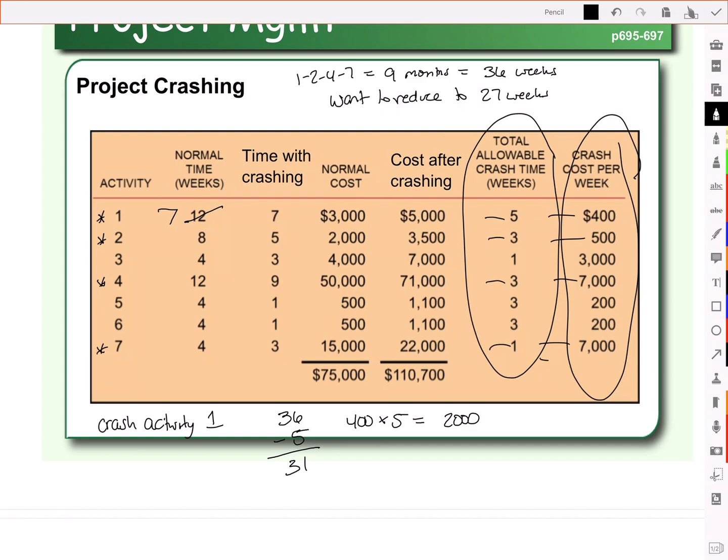So remember our paths that we found before were 1, 2, 4, 7; 1, 2, 5, 6, 7; 1, 3, 5, 6, 7; and 1, 3, 4, 7. Well, 1, 2, 4, 7 took 36 weeks before. And we just shaved 5 weeks off of activity 1. So now, it takes 31 weeks.